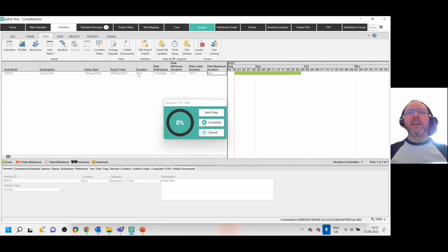That means that the initial 10 days duration has definitely been exceeded, and we've gone over into the next time period and incurred a cost there at that rate. We've not quite got enough delay to take us into October, so we've not gone into a double inflated calculation. Whereas if we click one more iteration on the step through, that one actually has taken us through.